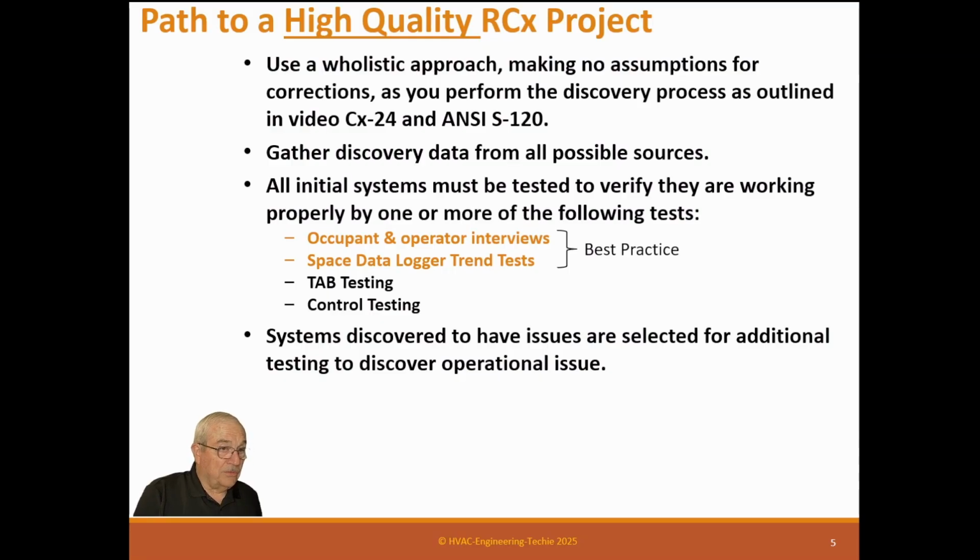Just go ahead and do an as found survey while you're there. Go ahead and do a point-to-point test while you're there. Get it out of the way, and then you'll know it won't be covering anything. And if it's a system that is working fine, that's all right. You needed to do it anyway, so it's good.